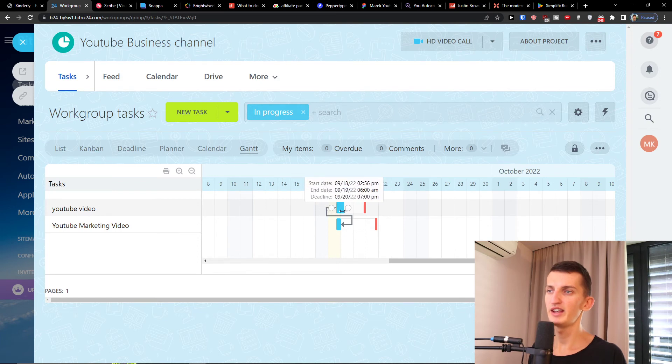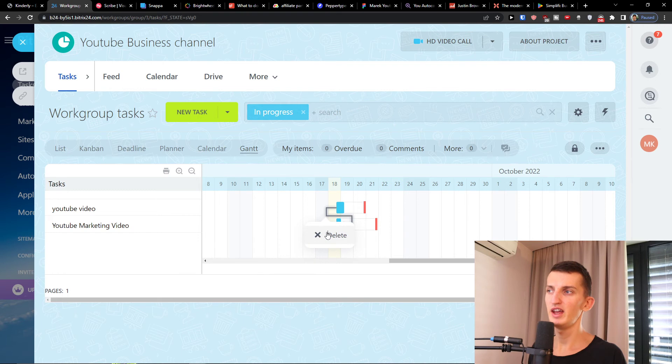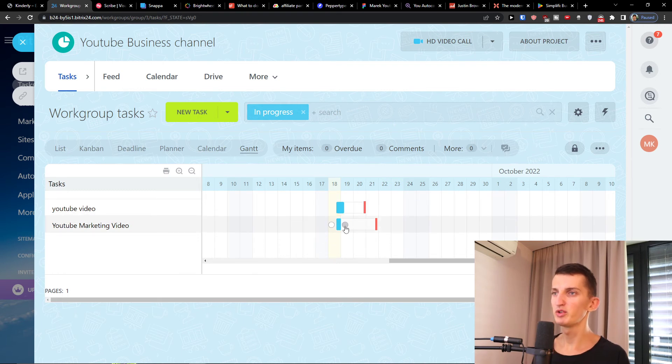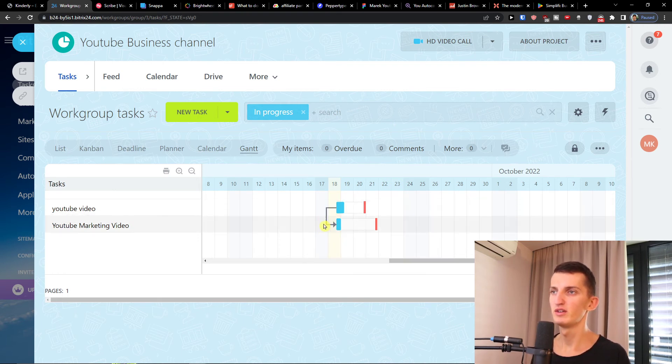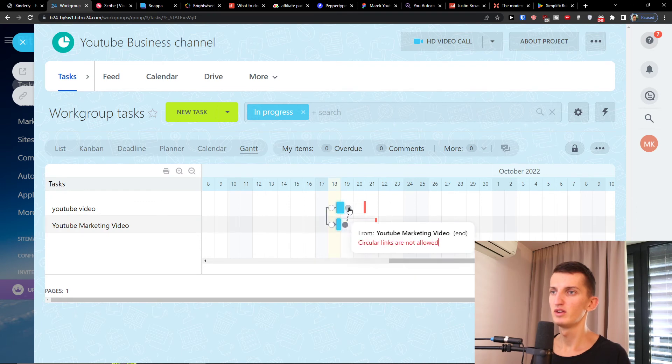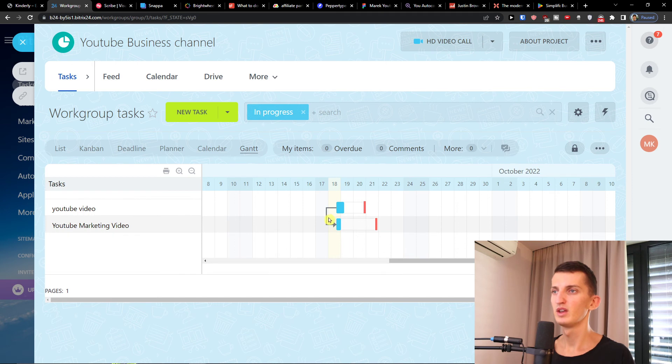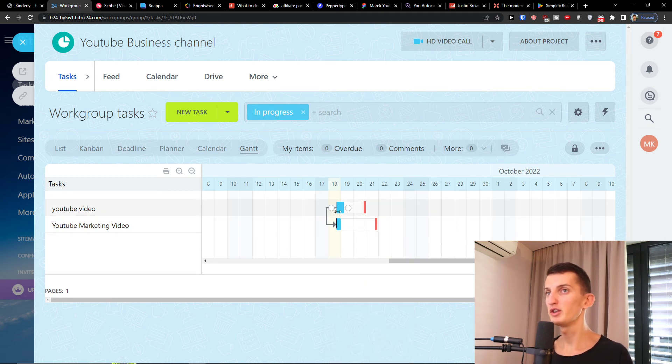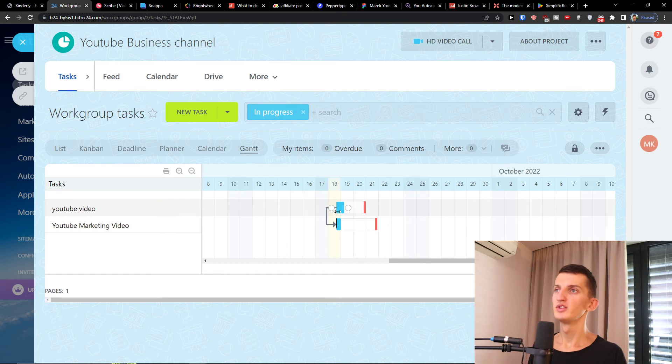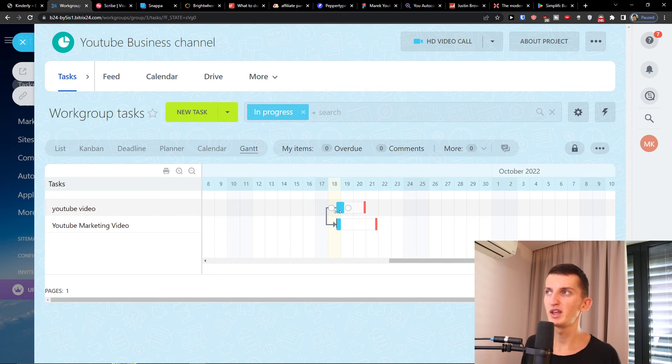Easy, simple as that, we have our own dependency created and you can always delete it. So it's going to be dependent one to another. That's how you can do it, how we can connect it, so this is pretty much it how we can use it.